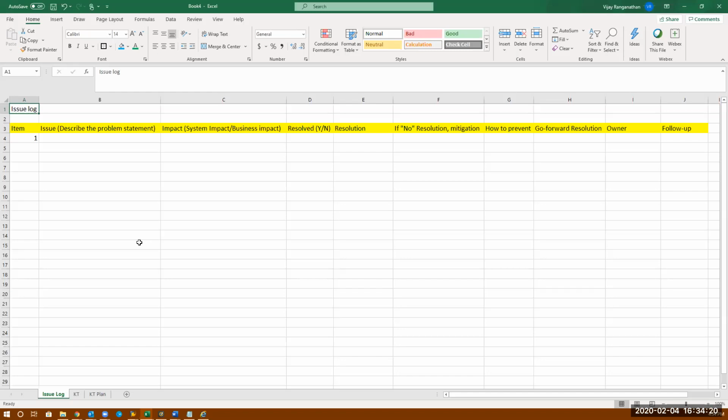Any thoughts, Kamala? My understanding is a concern is like there might be a problem, we are not sure about it, it might lead to some disruption. And an issue is like, yes, there is a problem. Exactly. So concern means before it becomes an issue.